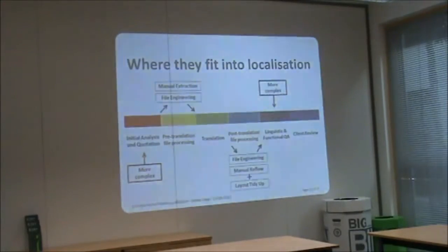From a project management point of view, if the project manager creates the quotes, then they may not have all the knowledge they need, so they might have to consult with not only the engineer but also with the typesetting specialist. And that stage will take longer as well. It's certainly worth giving as much time as possible to the quote. Clients always want the quote as soon as they can, but that stage, in my opinion, is the most important to get right. It's basically the plan, it's establishing what needs to be done for that project.